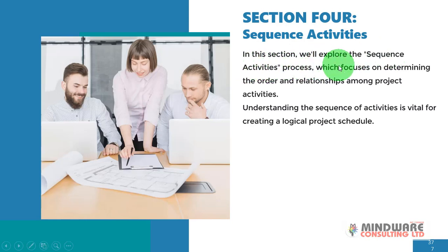In this section we'll explore the sequence activities process. This process focuses on determining the order and relationship among project activities. Understanding the sequence of activities is vital for creating a logical project schedule. This is very important for us to have a smooth flow in the execution of our project. We have to know how the activities logically follow one another.